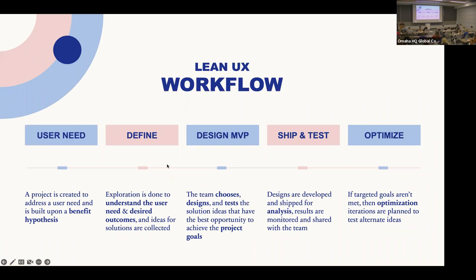Let's look at how a project workflow could be created based on the ideologies of Lean UX. At a high level, the first step is to understand the user need — that's when your benefit hypothesis is created. The second step is to define the opportunity and start defining the outcomes you want to pursue. The third step is to design the MVP, where the team works together to choose, design, and test solution ideas. Fourth is shipping and testing — the designs are developed, shipped, and tested for analysis. And finally, you plan to optimize: if you haven't met your goals, you plan enhancement iterations.